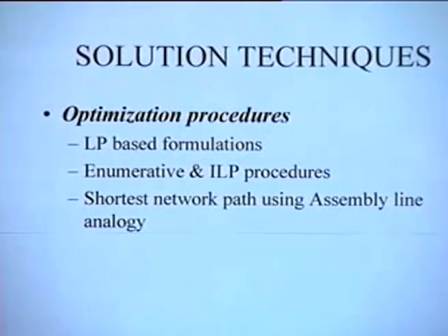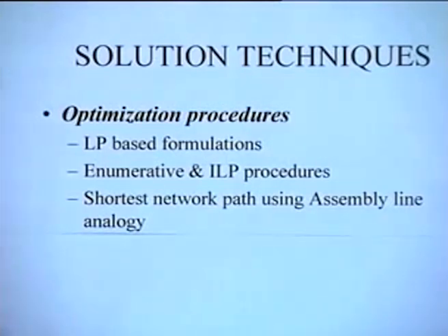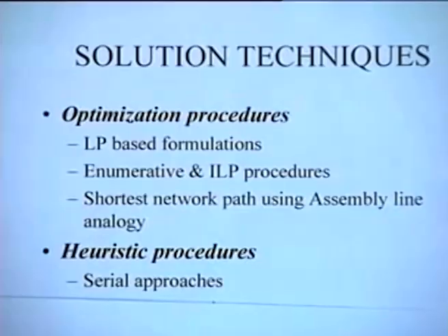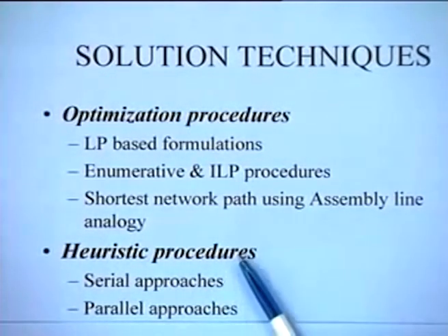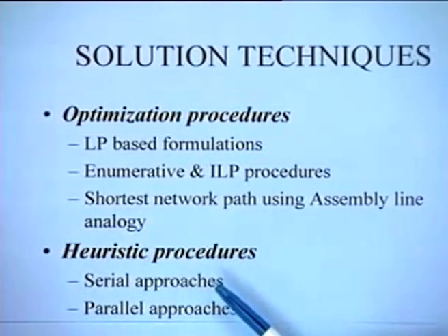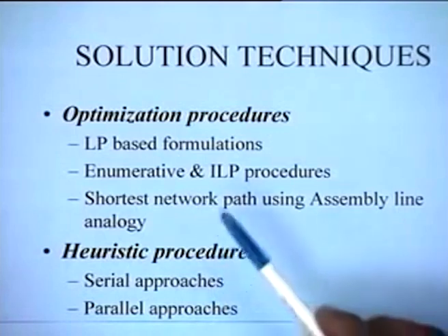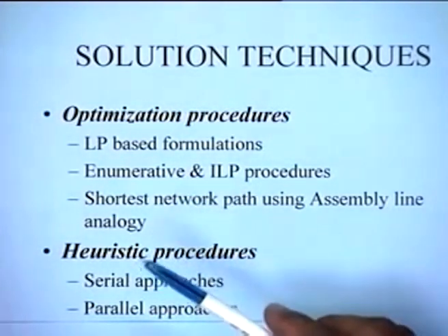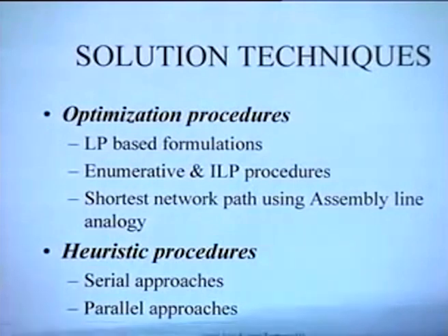So, although these particular procedures have been useful in research, and a lot of research has been done on them, they have not found their way into practical algorithms or into commercial software which is generally used for these kinds of purposes. The commonly used procedures are essentially heuristic procedures, and one way to classify these procedures is serial approaches and parallel approaches. These differ in terms of how the heuristic is used to basically select, out of the many possible combinations, the one particular combination that is to be scheduled.